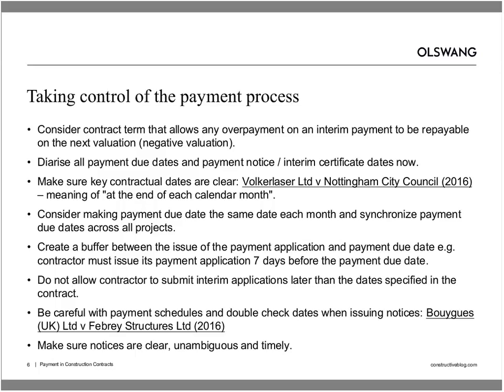There, the employer's payment notices were normally issued on the 20th of each month in accordance with a schedule which was attached to the building contract. However, the November date, as specified in the schedule, was the 23rd of November, and the employer issued its notice on that date, issued it on the 23rd, in accordance with the schedule.